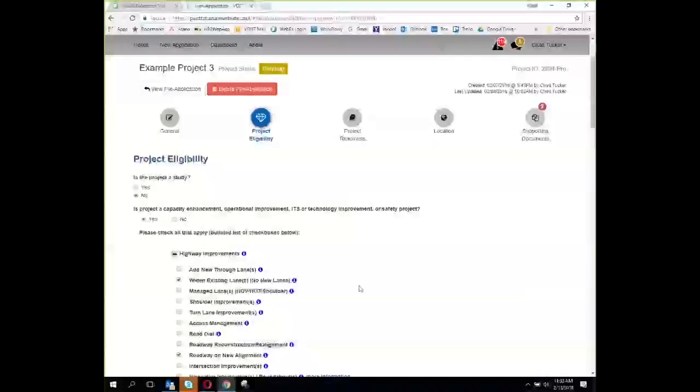You would only be able to request pre-screening on 4 of them, but you could submit all 6. You could go in and continue working in the full application on all 6. But in the end, when you get to the final submission deadline, you're going to have to select the 4 that you're going to submit. So 2 of them would remain in pending status and would never be submitted.